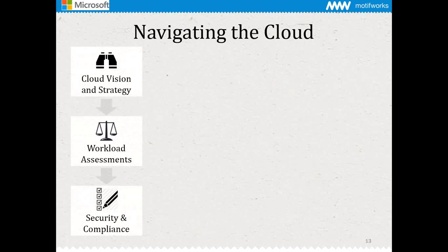Review your compliance and security requirements, and this is a big one. And I strongly recommend you involve your security advisors and auditors early in the process. Not to put brakes on what you're doing, but to make them part of the process as well. And I feel data security should not be an issue in cloud if handled properly. What we should do is understand the risk, classify the sensitivity of the data, and then classify these data assets into different categories. Based on this classification, it will help you identify which data sets or databases should move to the cloud and which ones should remain on-premise.